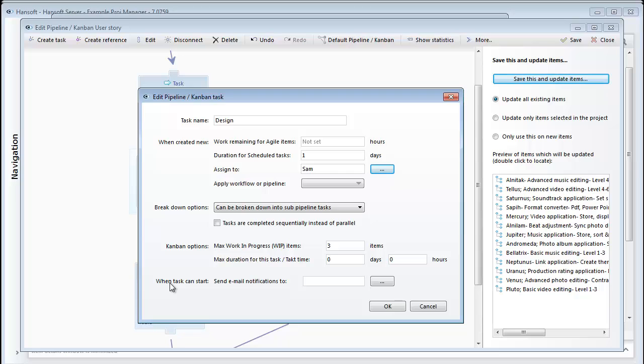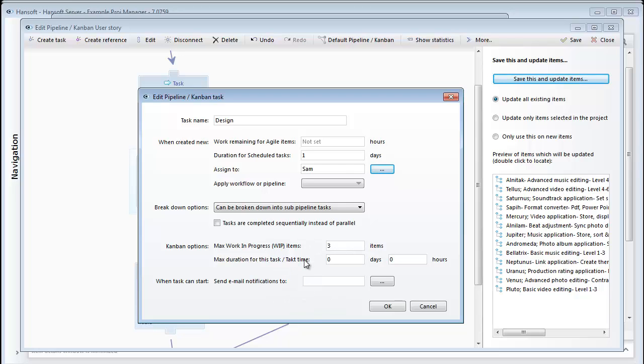There are some other interesting settings here. Maximum work in progress can be defined for each of the steps in our process. This indicates the maximum amount of items that we would like to have sitting in this step. The option underneath, tack time, allows us to limit the time we allow things to sit in a specific process step. So these options here are used in organizations that are actively working to become lean and continuously improve their work processes.